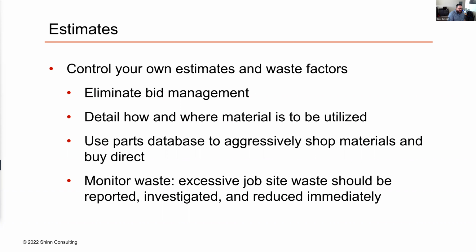And as part of that estimating, we're also, over time, building up this database of all of our parts and pieces that go into the home. I want to use that database to aggressively shop for my materials, and it's going to help me investigate buying direct. If I have this database and I can shoot off, here are my drywall SKUs, to four or five different suppliers in my market, that's going to allow me to very quickly start the process of doing those bid comparisons.